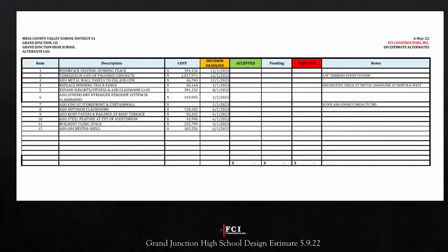Seems like anyone wants to build a house in town, that's all I hear. Absolutely. How do you solve that? And then also, on the mechanical side, they're teamed with a company called Mech One out of Colorado Springs to do all their fabrication. They're going to prefab all of the ductwork and all the parts and pieces and ship that here for Grand Mesa. They're going to supplement Grand Mesa labor when they need it, for those high peak demand areas. So we are reaching outside the area.